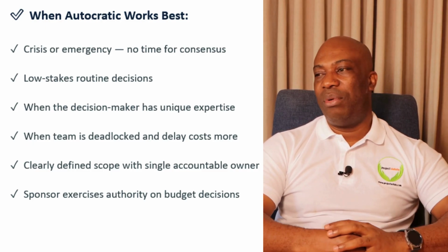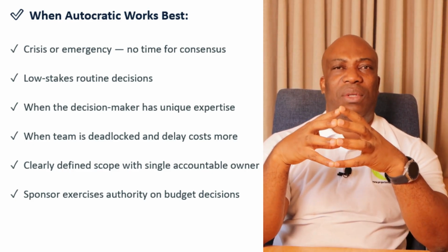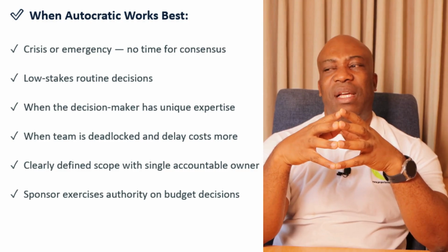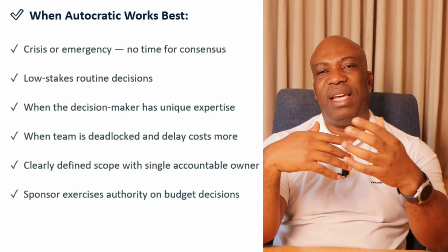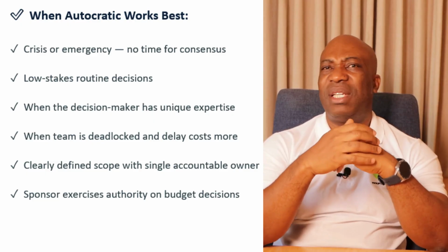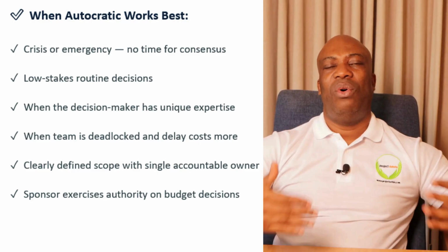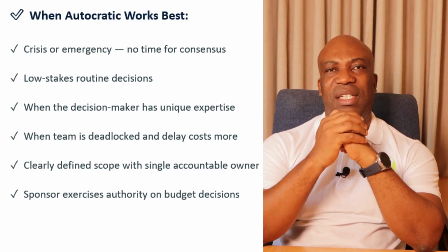So that is also very, very important. And in some cases, when there is a deadlock in a project team environment, or even the cost of delay is too much, one person can make a decision. In most cases, a sponsor. If the cost of delay is too much, a sponsor can make a decision, don't do it, or proceed to do it, and then we can fund it later.